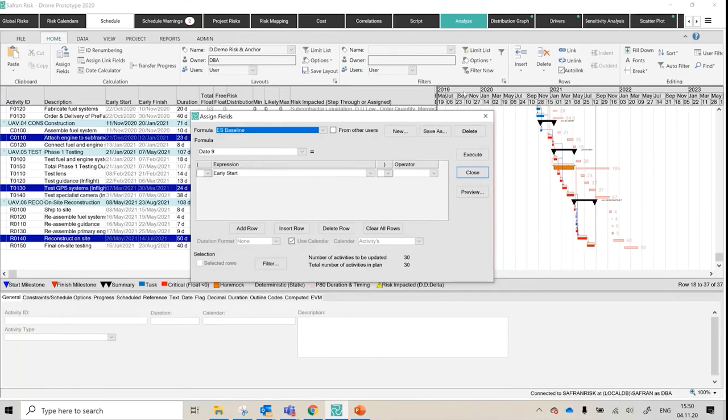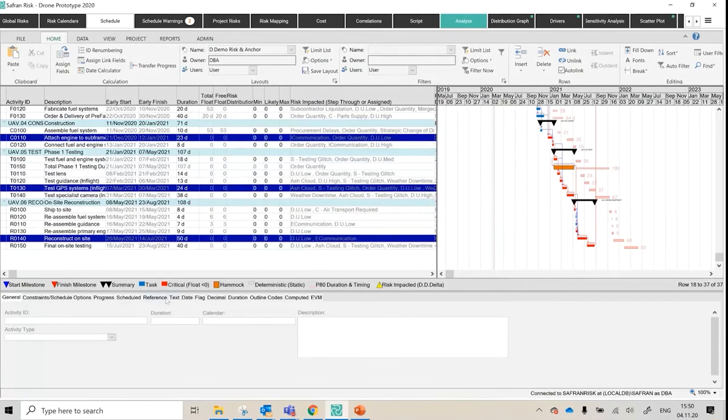So you know how you might have 20 or so dormant, like if you go to reference, text, date, flag, decimals, duration. So you might pick a duration, like I've used one here in the past. I probably used that. It says I've renamed it as well from duration 1 to deterministic. This is how I created my grey bars, I'm anchoring the grey bars against this thing here. This will not change. I can multicolor it until I'm blue in the face, but 9 will always be 9 until someone overwrites it with another value manually. So that will always stay in place.